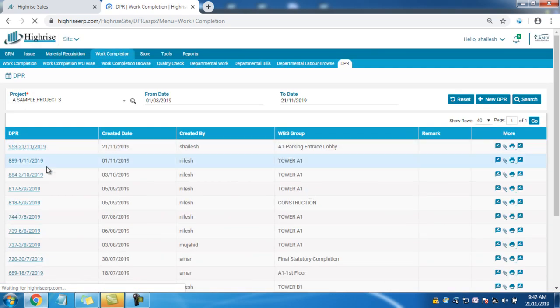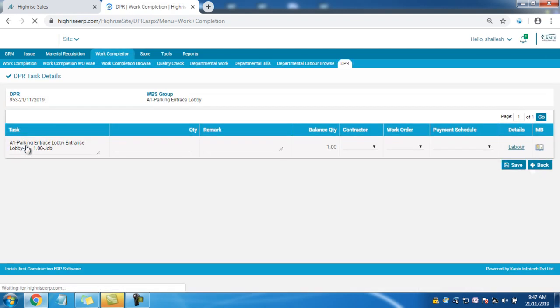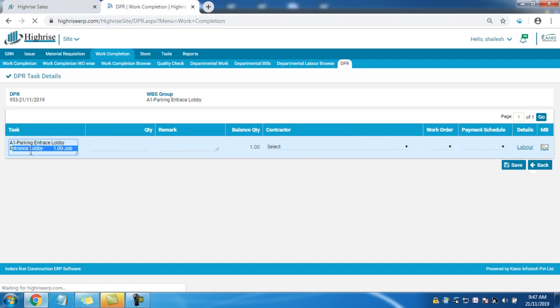So this DPR has been created here, its number is 953, and the date is 21st November 2019. Here I will select this DPR, and I can see there was one started task. The total quantity of the task is one job, and you can mention today's completion as per actual. If you want to mention any remark, you can mention it here. The balance quantity is here.